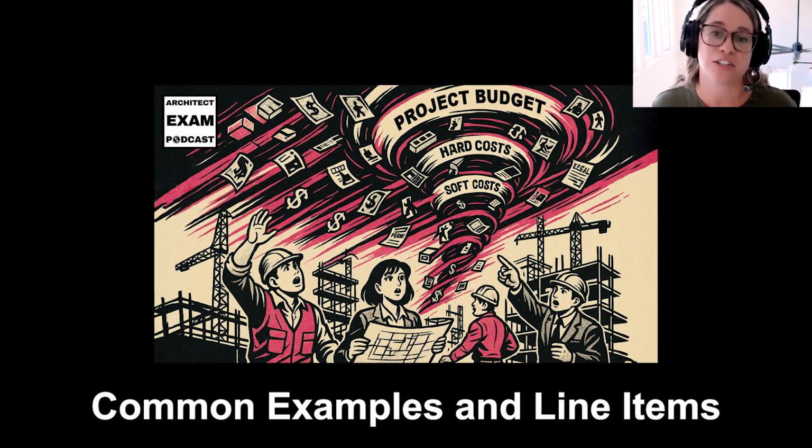Equipment costs are significant too. All of the machines and tools needed on the site, like the heavy equipment, like bulldozers, excavators, cranes, and even the smaller tools for specialized equipment. Don't forget scaffolding, formwork, safety equipment, and all the fuel and maintenance costs to keep all that equipment running is a hard cost as well.